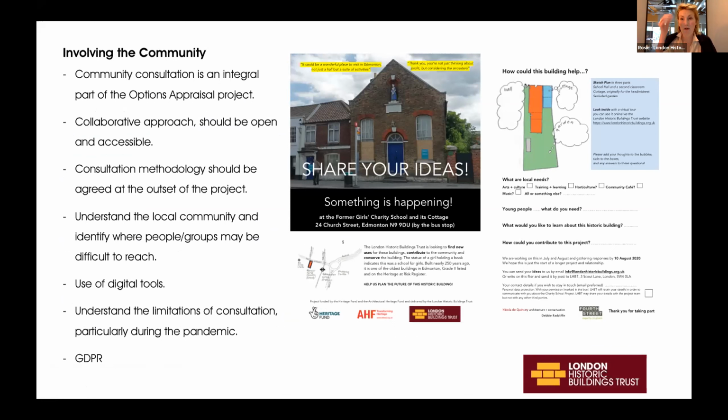So you have to think about whether it's open and whether it's accessible to a wide range of people. What's really helpful is to agree your consultation methodology at the outset of the project. We did this working with Nicola and our community consultant, Debbie Radcliffe. That means that you understand from the beginning how your community consultation fits into all the other aspects of your project, because all of these things are interlinked.